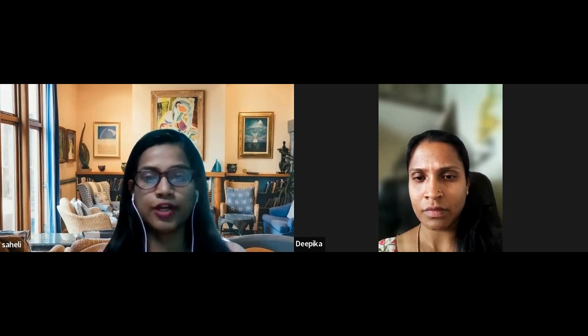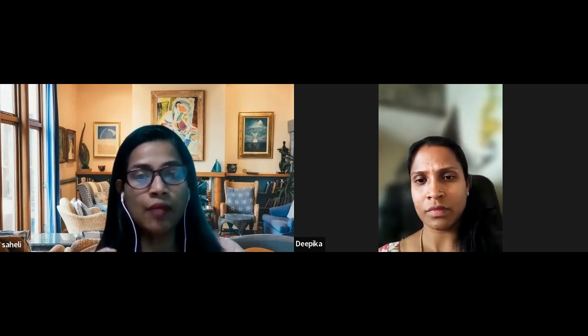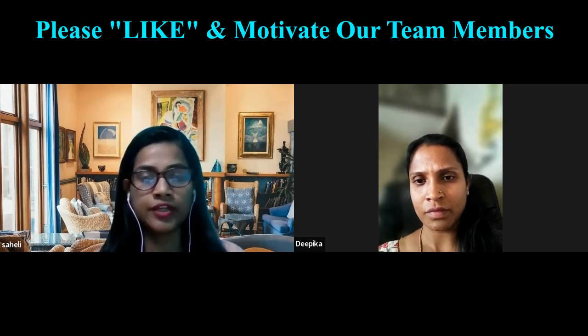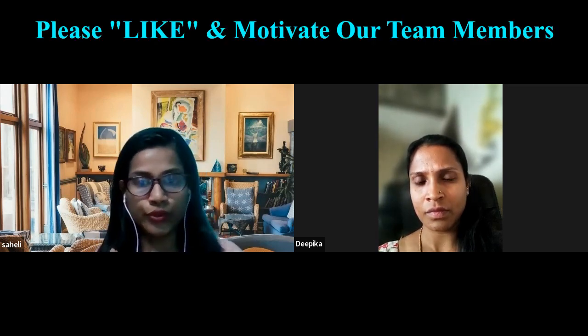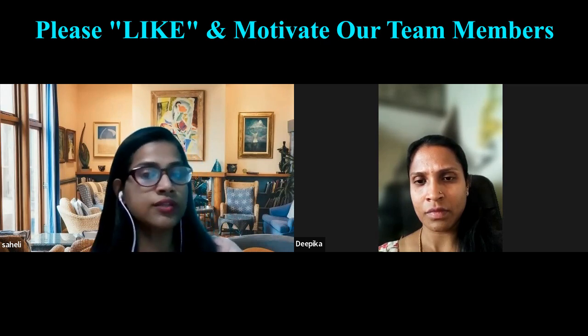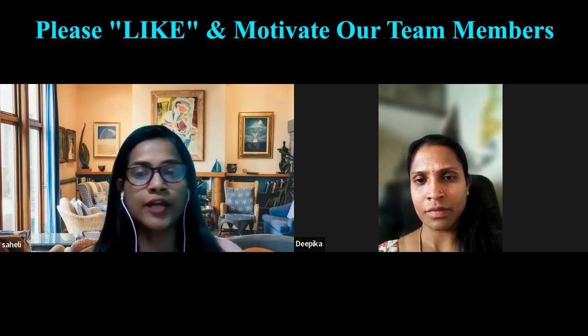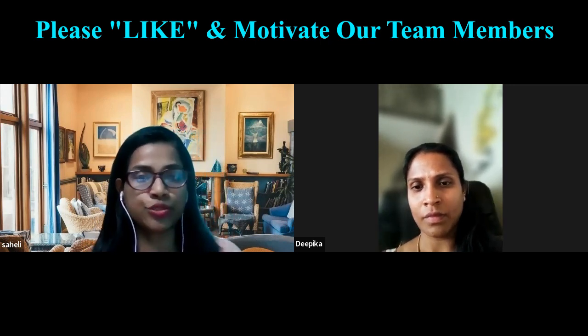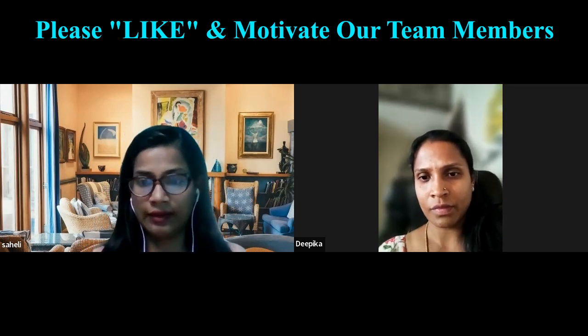So as a scrum master, we need to facilitate this discussion in such a way that after having some root causes, we have a convergent discussion as well. You should come up with some action items. As a scrum master, I should make sure or facilitate the event in such a way that, okay, these are the root causes. Now, what action items could we take so that we can avoid this from the next iteration onward? And I need to make sure that the team is following that.